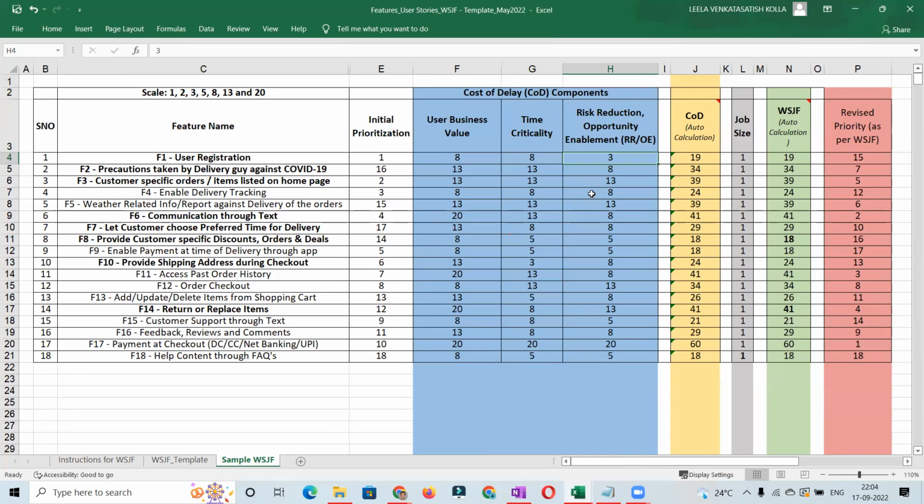So Sandeep, my recommendation will be different here. Depending on product stage, you can decide which prioritization technique you want to use. For example, if you are building a product from scratch, you do not have anything in place. In that case, you decide what my process will be like, and you have to go with the dependencies only. You build first the login screen, and then the workflow, and then at the end, the last stage of the product. At that time, you do not have much choice and you have to go with the process flow.